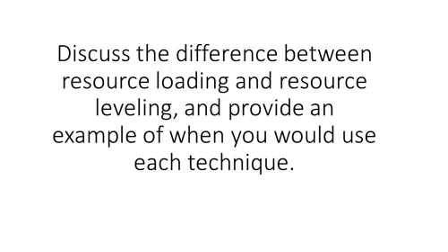Resource leveling deals with time and project resources, which include project budget and manpower. It balances the need of the project with respect to available resources at every stage of the project. Time and available resources are the two main components of resource leveling. Projects with higher priorities will be completed first with the available resources. In technical words, tasks on critical paths are completed first with the available resources.